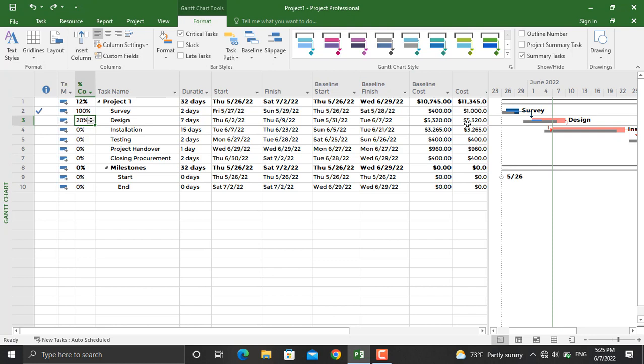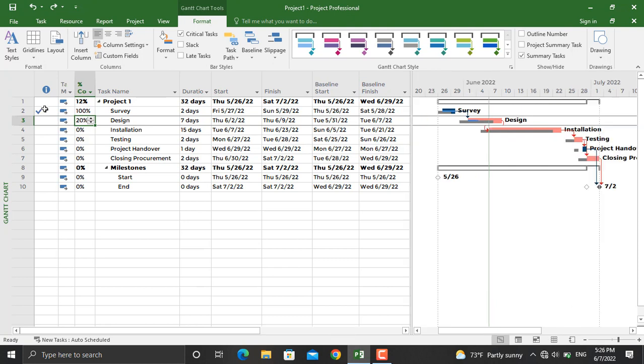If interested, you can watch the earned value report in the MS Project playlist on this YouTube channel. You should ensure such changes are made so that a proper burn down chart is created. Once the settings are done, go to Report, then Dashboards, and click Burn Down.